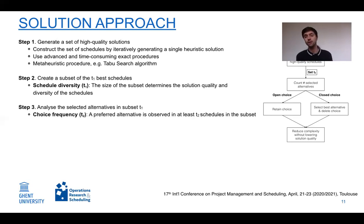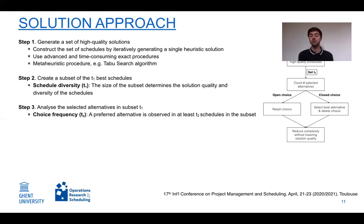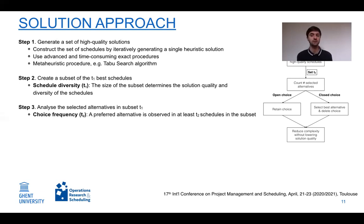In the next step, we analyze which alternatives are selected for each work package across all solutions in the subset. This requires a second criterion called the choice frequency, or T2. An alternative is only considered preferred when it appears in at least a certain proportion of schedules in the subset — specifically, when its frequency exceeds a threshold T2.